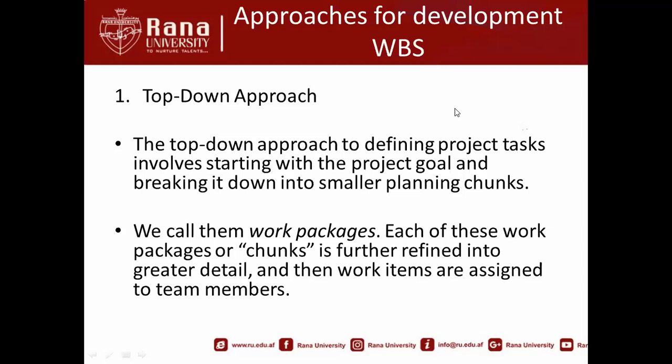So the top level manager decides what project should be implemented. They will create the first level of the WBS, and they will also set the goals. The middle level manager's work will depend on the top level manager. They will further divide these activities into sub activities. And the third level, the operational manager, or let's say the lower level managers, will divide the middle level managers' work into small tasks. Okay, this is one approach.